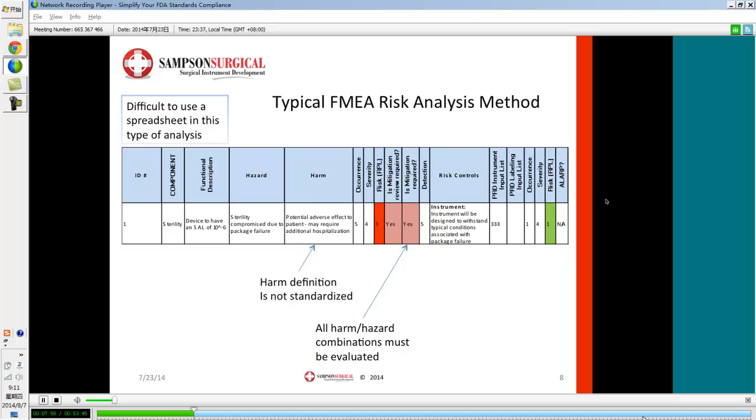Hazard combinations must be evaluated. So in the past, what I've done is have a discussion about whether the mitigation is required based on the risk priority level that's been calculated. Internally, often companies have this progression where you say a 1, we don't have to mitigate; 2s, we might think about it; 3, we always have to mitigate, that type of thing. Well, now the idea is that you mitigate every risk and you do it to the level possible, not to the level where it's below a certain level in some kind of arbitrary scale.